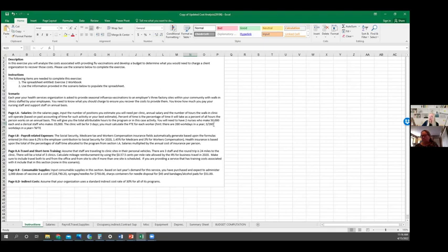You're going to need 2 nurses. They each make $50,000 a year, and a clerical staff person who makes $35,000. The clinic is going to be for 3 days. So you're going to have to calculate the FTE for each worker. So the hint for that is there are 260 work days in a year. So you take 3 divided by that, that will give you the percent FTE. Okay. So, and I'm going to walk through and not do it.